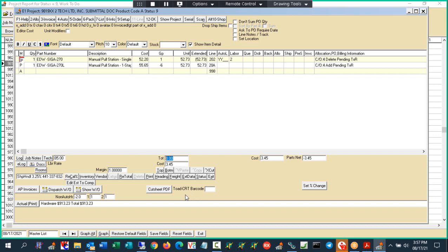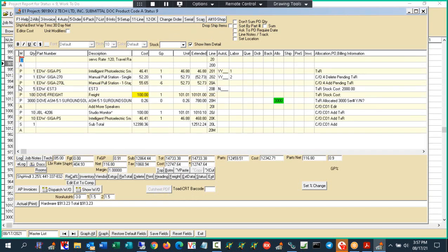Well, I realize, but I'm just saying, would it be reflected here? Yes. Or would it recalculate it? Because the price is fixed, will it recalculate it? When does it recalculate? When you approve the change order. So right now the costs are reflective of this $52, and when I approve the change order, this $3 difference is going to affect this puppy down there.